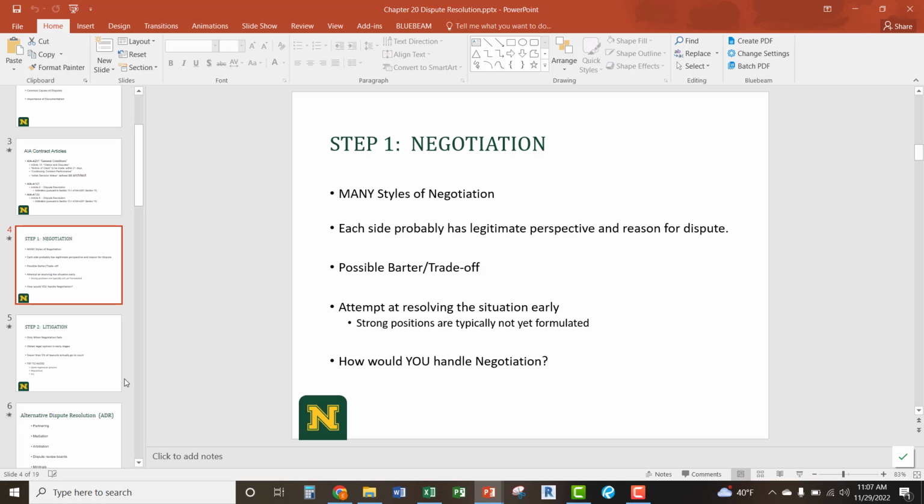Again, going back to being reasonable, dealing with things promptly, making sure that in pre-construction before awarding subcontracts we know how we're going to deal with disputes, so that you can't just bring things up at the end of the project because you looked at your books and you didn't make money like you thought you would, so we're going to figure out ways to back charge people to make up for the difference, right? That kind of stuff might happen too. So if you have time limits set for your project on when disputes can be brought up, normally that helps alleviate a lot of the problems.